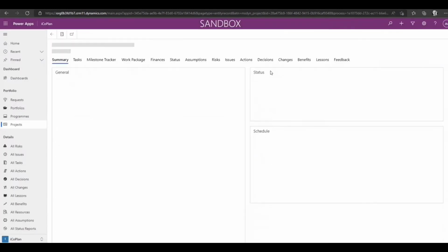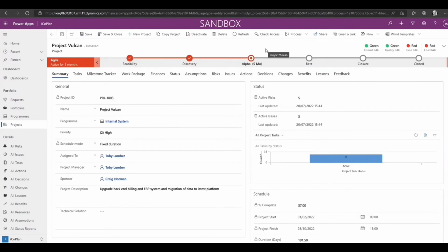So you're able to switch the stage or even define the stage at the start of the project when it's created as well. So Legal and General have like this little process where you answer a few questions, and then it defines based on the answers to those questions which channel of change it goes down, and therefore creates the project with the right life cycle in it. So it says, what's the cost of it? The cost is 40 grand. How many teams are you going to be using? Well, 2. So it's being led by, it's not an IT project, so it's a business change project, and therefore it automatically creates the project in with that set stage.